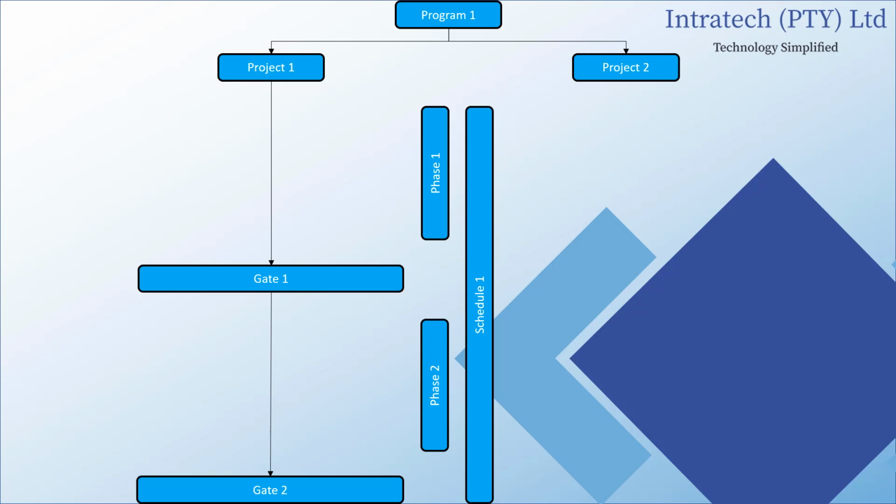Phases do not have to be sequential, and more than one phase can be in work at once. For the moment, we're going to avoid using gates in our project. The reason being that this is a fairly intricate aspect with significant knock-on effects on the project if used incorrectly. Rejecting a gate will entirely and irreversibly cancel the whole project, so until we have a good understanding of the 3D Experience platform, we will steer clear of this potential trap.